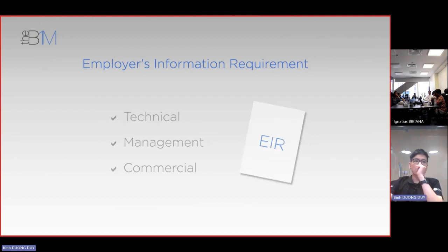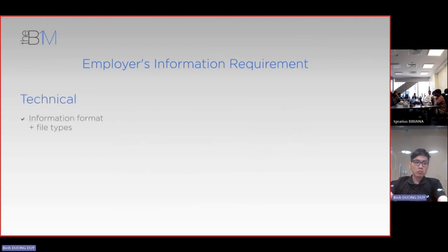Technical will cover things like information format and file types, the minimum levels of definition at each stage, and the software platforms to be used for exchanging information. For clients in the public sector, this doesn't mean you have to endorse a particular vendor. It could be stating your preference for email or explaining the common data environment you will be using.